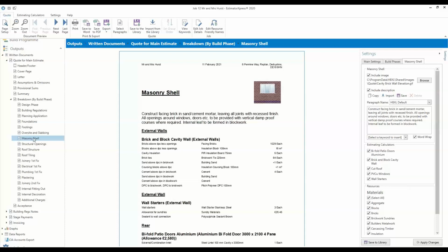It shows that you haven't just plucked the figures out of the air, as some builders will do. You shouldn't be scared of supplying a good quote that shows it's been carefully estimated. If you are worried about your quote being passed on, then what you can do is two copies of the quote. You can print it once with quantities, once without, when you meet with a client, or if you're showing it to them perhaps over a Zoom meeting or whatever, you can talk through the quantities with them then, but then the copy that you leave with them or you email over to them perhaps doesn't need to have quantities on there if that's something that you're concerned about.